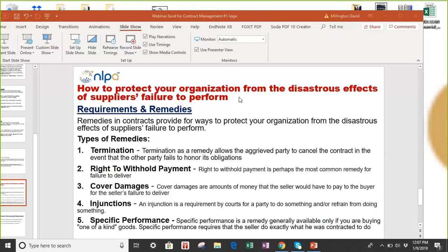If you have a risk priority number of 800, that means the particular agreement or synergy you have with that supplier is high risk. That's a high risk supplier, and immediate action has to be taken to replace a supplier who poses a risk of 800 to an organization. You need to change suppliers.